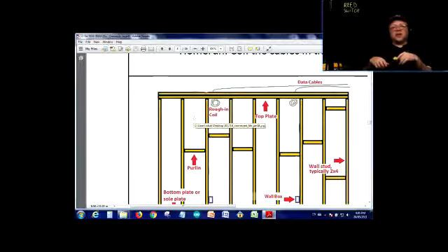Please give us a paycheck for that much money because this milestone is complete. It's a good idea to have milestones, because if you just do this job from the beginning to the end and say, you're going to pay me when I'm done, please try not to do that. At the end, the client has a lot of bills to pay, and if you can wait, he's going to make you wait. Right? So try to charge the client in milestones.